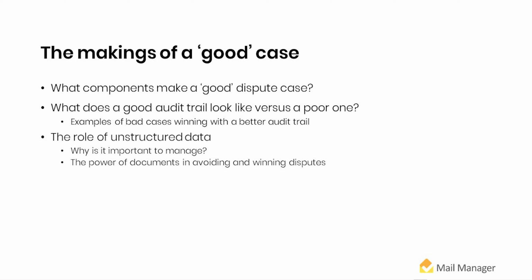And again, in my jurisdiction, we're just introducing adjudication, something that the UK has been dealing with for a while. But the big discussion here is, with the timelines in our statute, when you only have 5 days to respond to an adjudication notice, how are you going to do that if you don't know where the documents are? Or as May alluded to earlier, if somebody's left the company and they were the key project manager, how are you going to get their emails? How are you going to find the banker's box of documents that they've filled up and left in the corner of their office and know that that's where your critical document is?